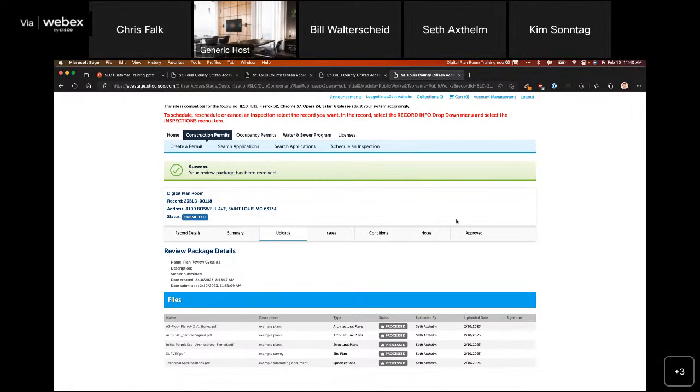Okay, so everything has been submitted. The permit processing team has reviewed and deemed everything to be complete. Your review moves forward towards plan review. So at that point, all the plan reviewers will receive notification on their end that it's ready to go ahead and review your documentation associated to your application.